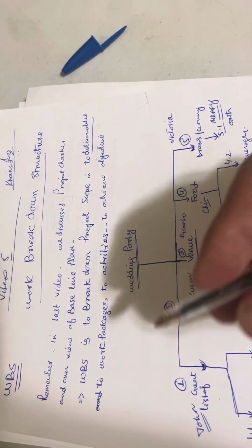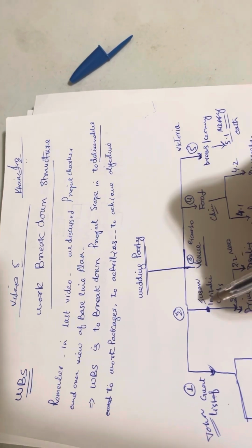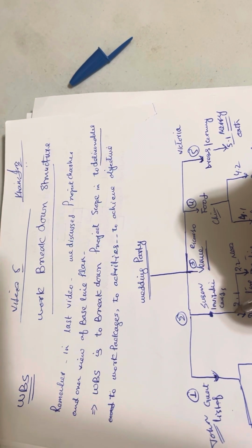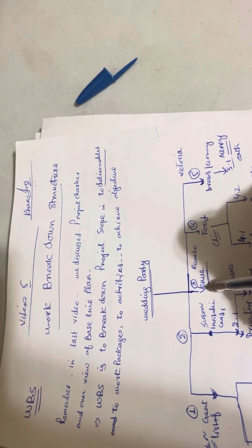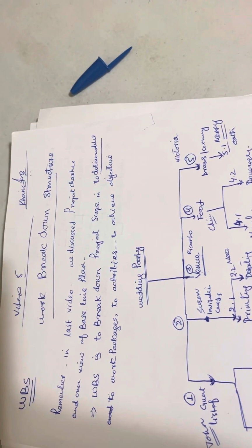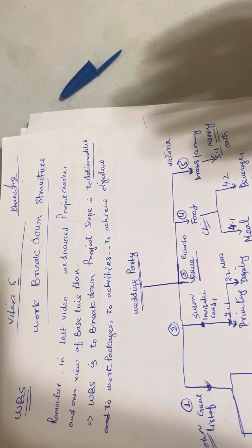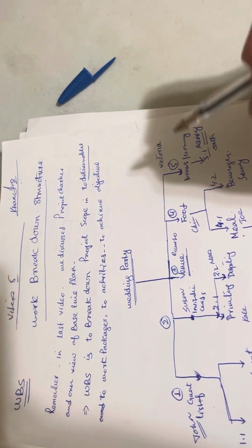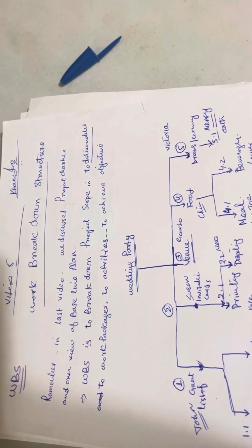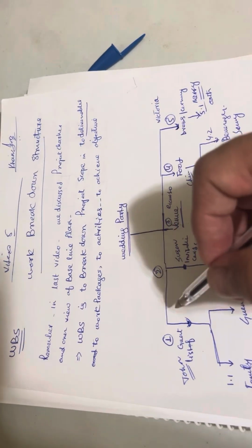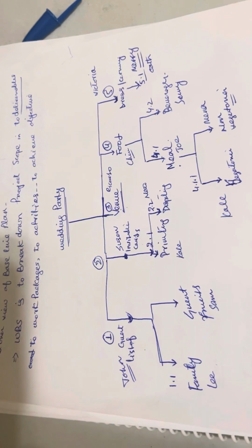So what I did, I drew a line, and first I put the list of the guests. I give number one to the list of the guests deliverable. The second deliverable is the invitation card. The third one I put the venue, maybe it's a hall or some place you can manage. The fourth one I put the food, that's the deliverable. And the fifth one I put the dress and ceremony. So I give 1, 2, 3, 4, 5 major deliverables, that's what we need for our wedding party.